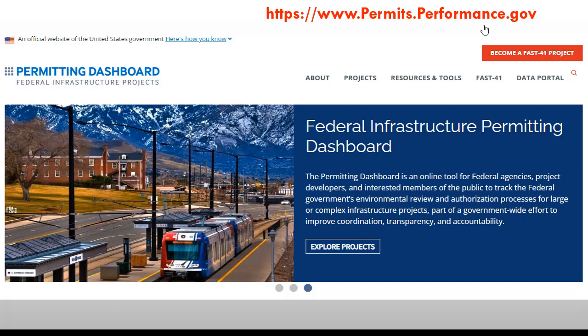No. The 90 days is after we've received the completed application. So once the completed application with the final environmental document from the lead agency or the finding of no significant impact or record of decision, and we've received all the other requirements like the water quality certificate, 404 from the Corps, if there's a BO, if there's anything from any other agency, we need to have all that in hand before we consider the application complete.